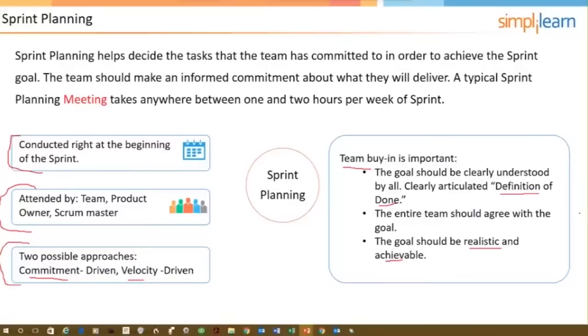And that's where the Scrum Master comes in. The Scrum Master plays the role of the mentor, the coach, and assisting in the resolution of those kinds of issues without deciding. The Scrum Master is not a decider. The team decides when it comes to how, and the product owner decides when it comes to what.